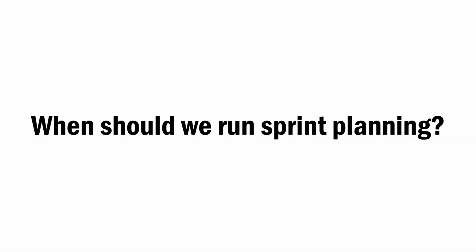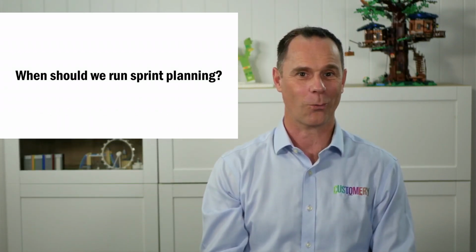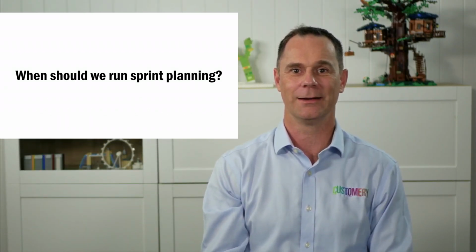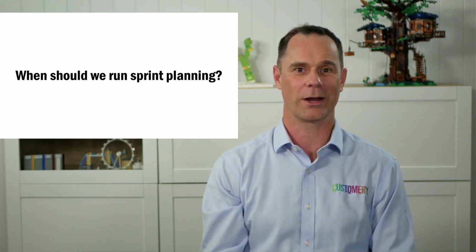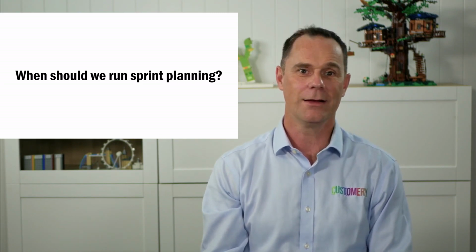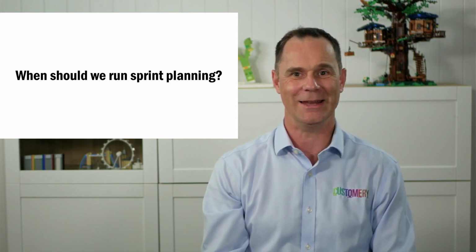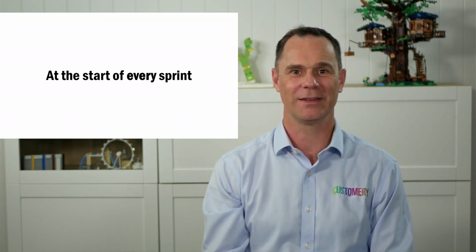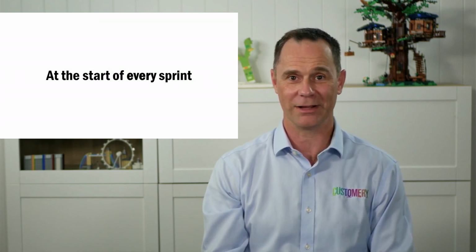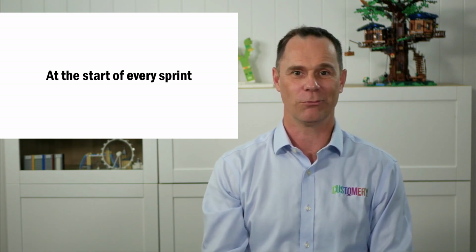When should we run sprint planning? Sprint planning needs to be completed before you start work on any items in the sprint. You can either conduct sprint planning late in the afternoon and start working on the items first thing the next day, or conduct sprint planning in the morning and then start work immediately afterwards. Like sprint reviews and sprint retrospectives, sprint planning is run every sprint. You can't run a sprint and you aren't practicing Scrum if you don't run sprint planning.